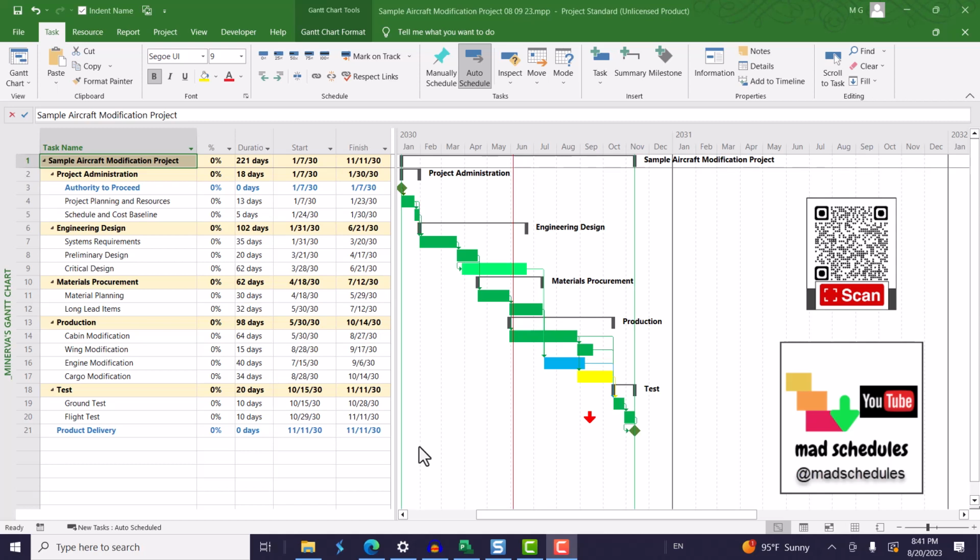And also it looks into resources, but I don't like to resource load my schedule, so we will skip that one. You can look it up online. There's a lot of information on that, I think. And then missed tasks. Missed tasks are tasks that are due in the past that you're saying you completed everything till now, or till the date that is your status date. So if it's your status date and the tasks are due before that, then those are missed tasks.